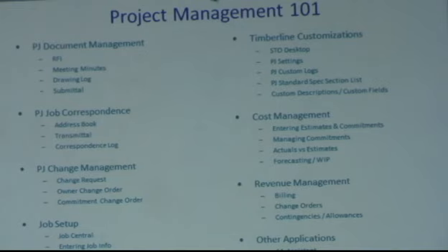One of the most powerful things is the change management system, so tying in the project management process to the accounting process. So being able to update your estimated costs, being able to update your contract schedule values to get ready for billing, and sort of tracking what are all the requests that we've sent to our customer, which ones have they approved or not, and what things do we need to issue to our subs or vendors. And do you guys typically hire subs or you self-perform everything? Okay.